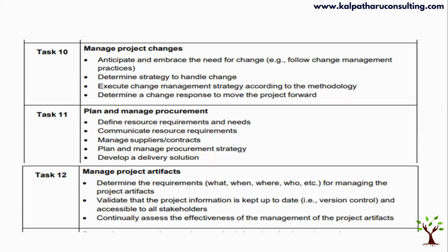You come out with a procurement strategy, and then you define the acceptance criteria or evaluation criteria, and then you're going to assess, evaluate, and then bring the vendor into the project. You're also going to check whether the vendors are supplying the materials as per the requirement, where you're going to use audit and inspection as the processes. And then once everything is done, you're going to make the payment and then close the procurement. So procurement is again a very interesting topic. So that is task 11.